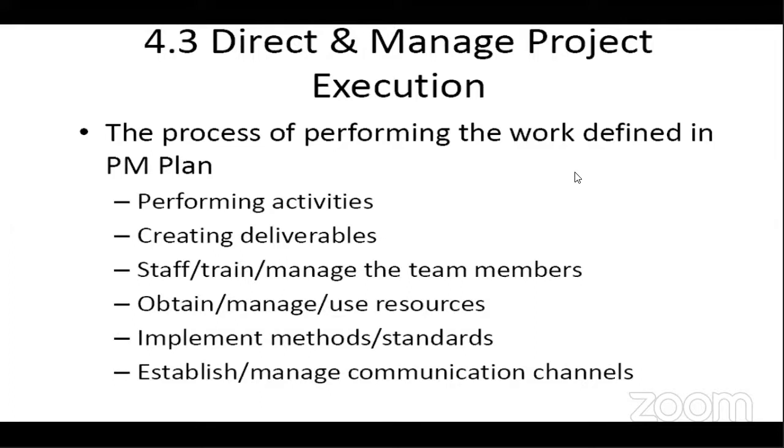The only difference between the two is that your project management plan is the first thing that is formed, and the monitoring and evaluation plan is contained inside the project management plan. I'll repeat that again. The monitoring and evaluation plan is a subset of the project management plan. So if there is any difference between the two, the difference is that the M&E plan is inside the PM plan. Okay, does that make sense to you, Adetunji Fasoranti?